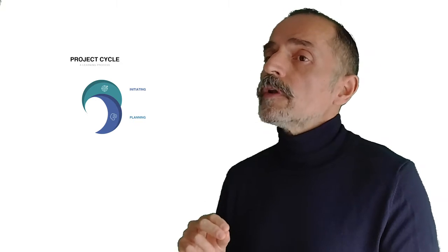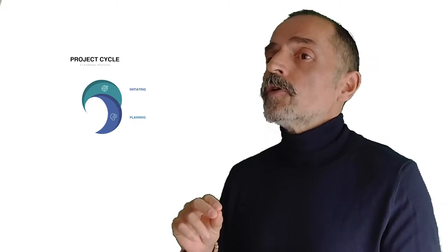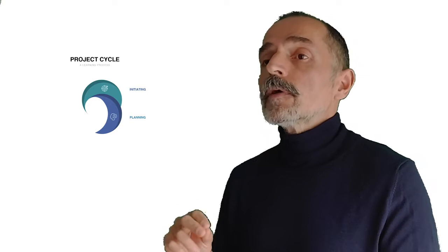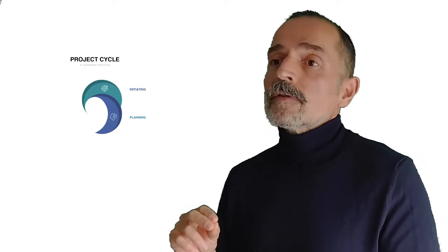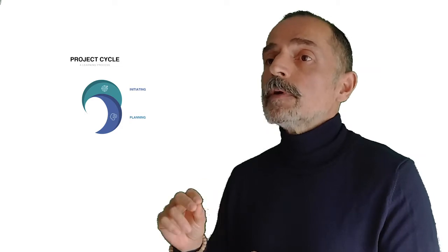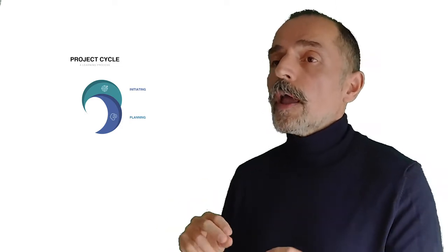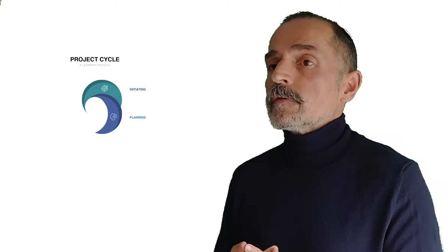Why should you only start the budgeting after you have designed all your activities? Because budgeting according to PMM is activity type. So you budget activity per activity, both support and production activities.